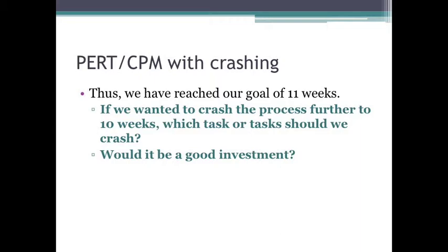That said, is it a good investment? Not really, no. After all, to do that, it would cost us $1,200, but we'd only save $1,100. So it probably wouldn't be a good investment in this case. Anyway, so that is crashing.